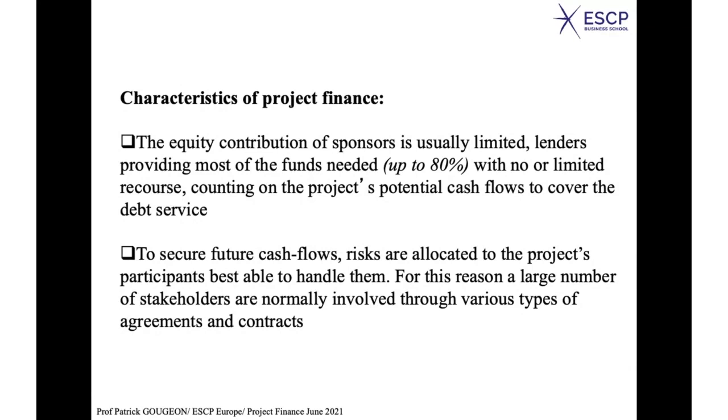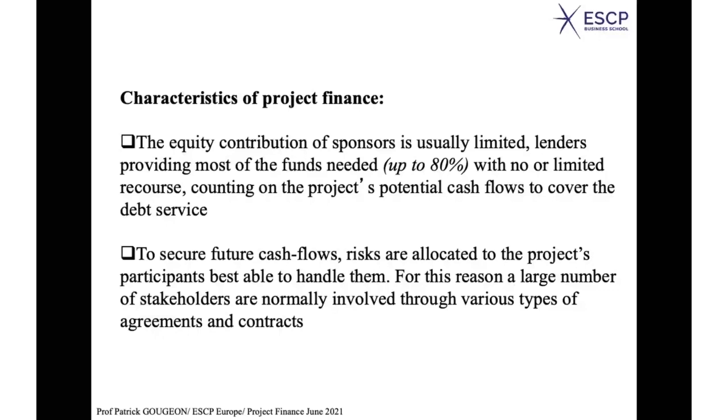That's why you need a careful risk analysis, and also you need to find a way to allocate the risk to the many participants that will join and participate in the project through all types of contract. And if you are able to do that, then lenders, because the cash flow would be highly secured, would accept to come into the project with no or limited recourse.